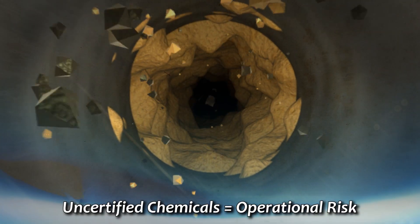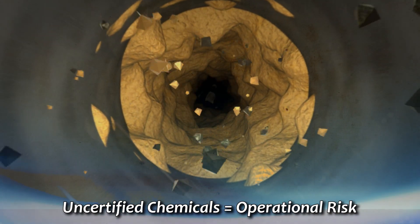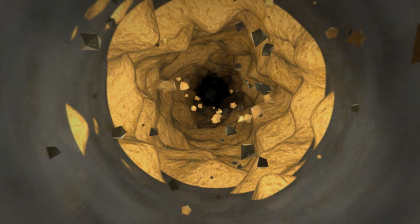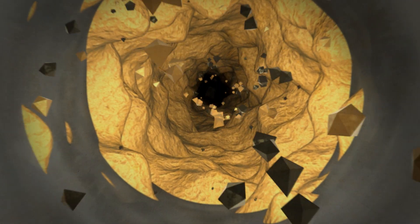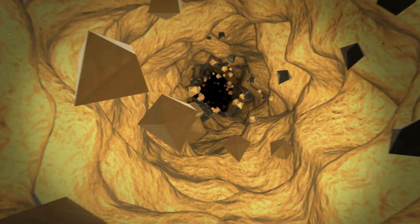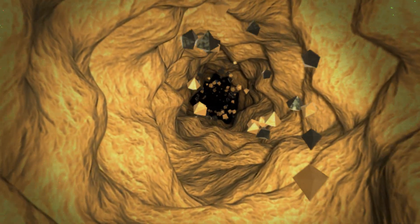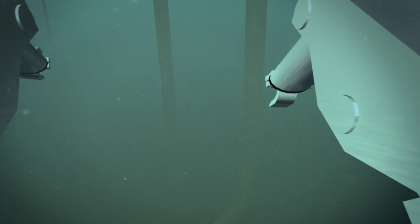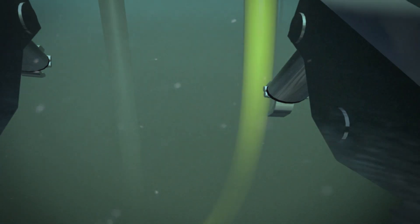Umbilical failures in a subsea project can lead to complex operational risks, repair downtime, expensive replacement costs and loss of production. There are long lead times when a new umbilical is required, typically at a cost of one million dollars per kilometer. Tiebacks can be over 20 miles long.